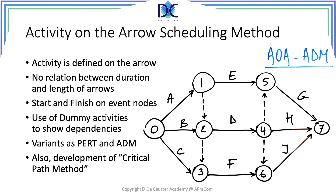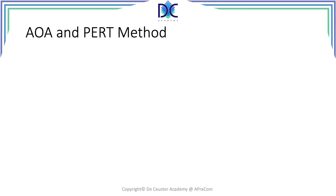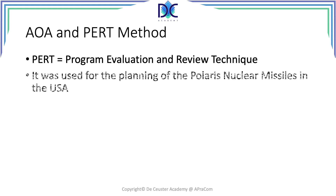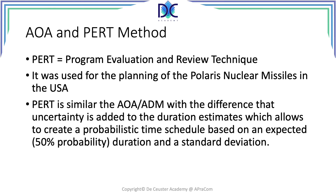The activity-on-arrow method and the Arrow Diagramming Method were among the first ways to create network diagrams, and the Critical Path Method was developed based on them. Now let's look at what we call the AOA and PERT method. PERT stands for Program Evaluation and Review Technique, and it was originally used for planning the Polaris nuclear missiles in the USA. The PERT diagram is similar to the arrow diagram, but it adds elements of uncertainty to duration estimates.